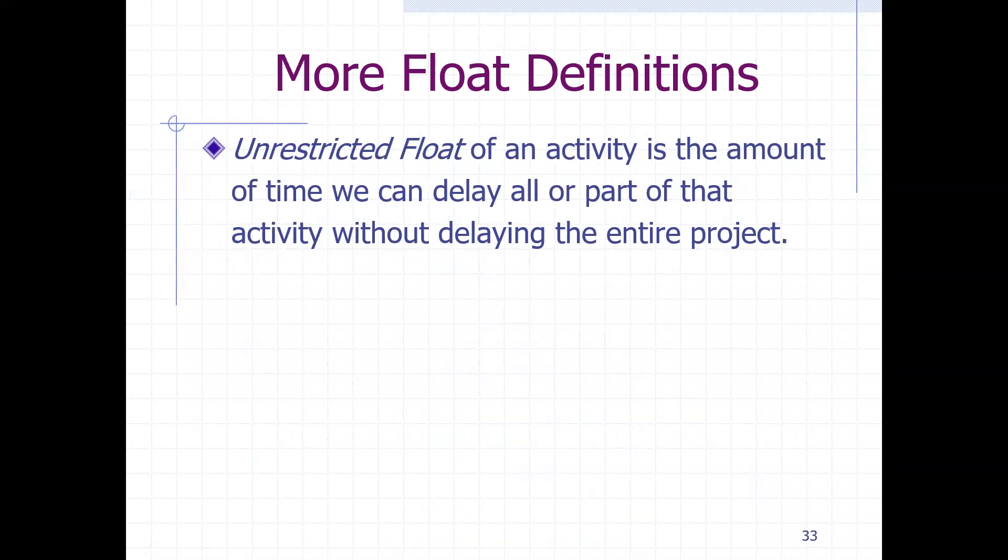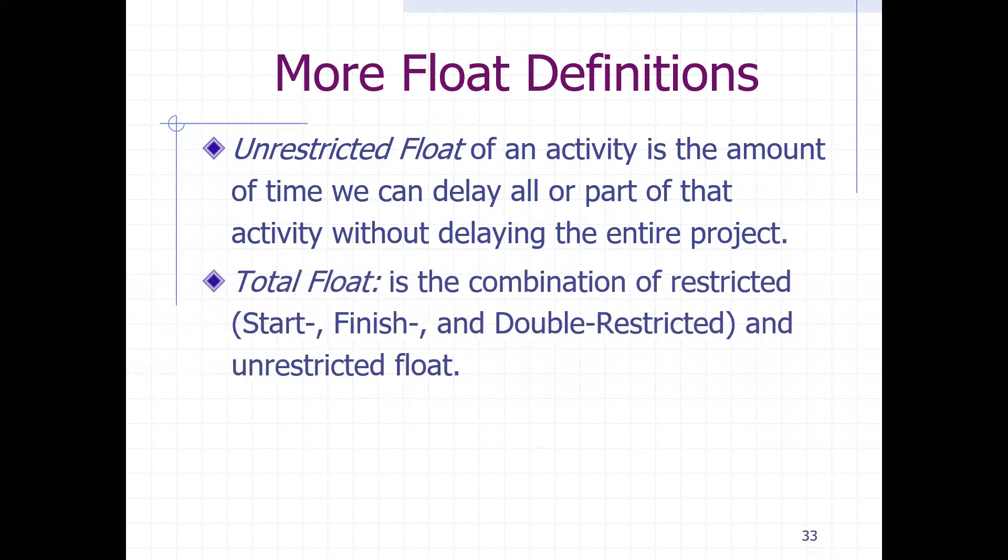More definitions on the float: unrestricted float of an activity is the amount of time we can delay all or part of that activity without delaying the entire project. Total float here in this context is the combination of restricted start, finish and double restricted and unrestricted floats. So this is how we refer to the total float.